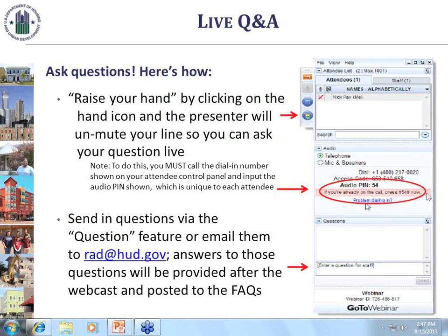Generally, if you're coming into RAD, forget the fact that this is a project that already received tenant protection vouchers and SAC approval, right? Normally we would say you can't jump the gun. We'll let you demolish the units once we approve your financing plan, because otherwise we'd be allowing you to go ahead with something in which we have no guarantee yet that you have hard replacement units on the back end.